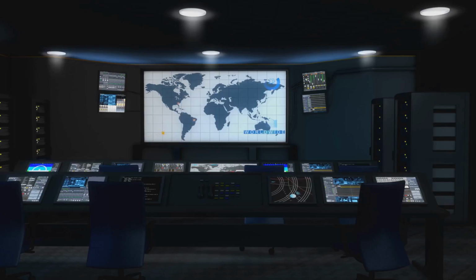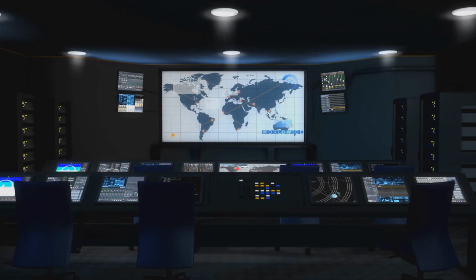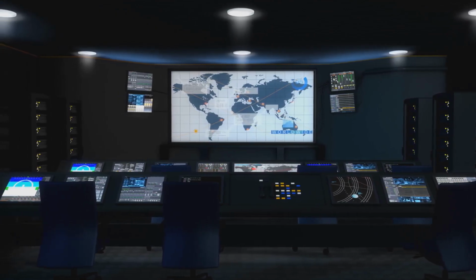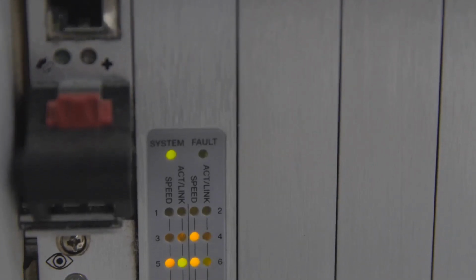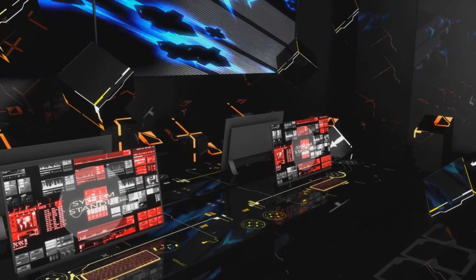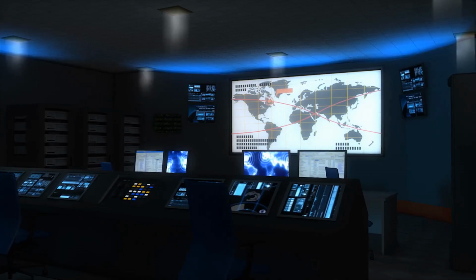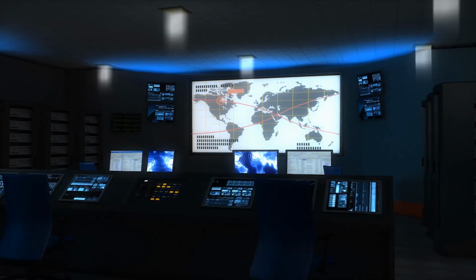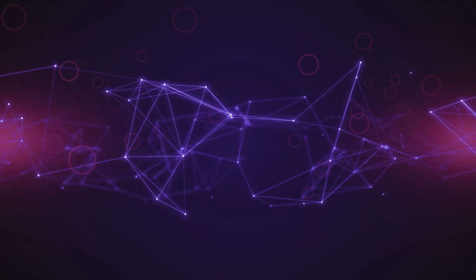The system ingests a wide variety of data inputs: detailed population density maps, property types, average household income levels, existing internet service usage from billing records, local business activity, new housing developments. Machine learning models get to work. Random forests, gradient boosting. They learn from past rollouts what combination of factors predicts success. The output: a heat map of the entire region. Scores down to individual buildings on likelihood to subscribe. Planners focus marketing and construction where ROI will be highest and fastest. Far more efficient than blanket marketing or speculative builds.